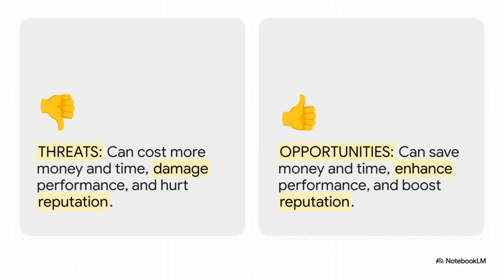See, risk has 2 faces. On one side, you've got the threats, the downside. This is the stuff we all worry about, right? Things that cost more money, take longer, or hurt our reputation. But on the other side, you've got opportunities, the upside. These are the unexpected chances to actually save money, finish early, or even boost performance. A really solid risk process looks for both.